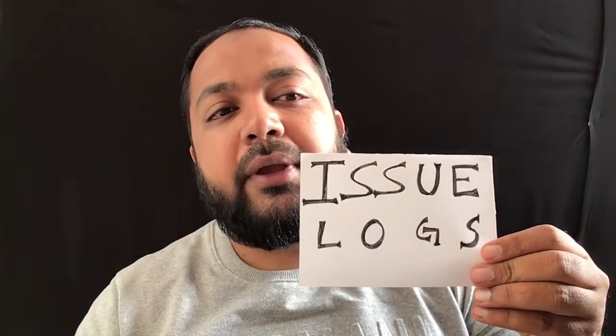Similarly, you would have planned for some mitigation plans in case some issue happens, and sometimes you might miss out on those mitigation plans. At that time the risk will become an issue, so you'll also refer to and update the issue logs. Remember these logs, the issue logs, defect logs. These will be referred to and updated throughout the project.